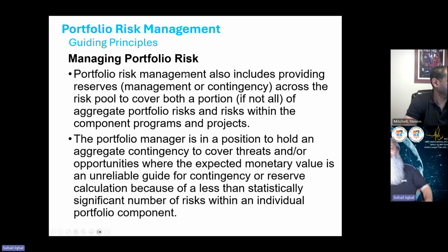Portfolio risk management also includes providing reserves. Now, you say we do that everywhere. We do that in project management. We do that in program management. Yes, but here, when we are talking about portfolio, these reserves are huge. They are for all the components within the portfolio. So this is a huge reserve. These are the management or contingency reserves across the risk pool to cover both a portion, if not all, of aggregate portfolio risk and risk within the component programs and projects, all of the risk.